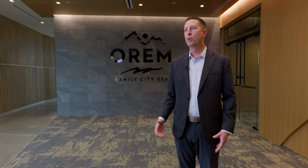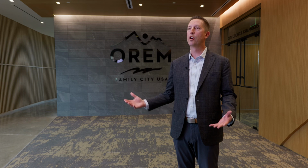Okay, so the CMGC process is a little bit different than maybe some are used to. It stands for Construction Manager / General Contractor. So Layton is brought on to be not only the contractor for the project, but also a construction manager, which means that we work with the project team to help them to keep the project within budget and on schedule. We're brought in early in the design process. We work with the architect alongside the owner, and we work to develop budgets that are going to help the project be successful to meet the end project budget. We help them with cost of materials, different types. What are some of the options we can do to help this come in within budget? So it's a more unique role than just being the contractor on the project.